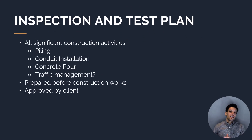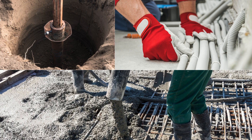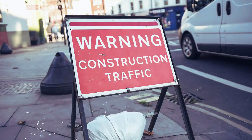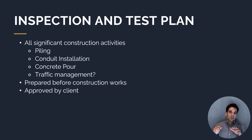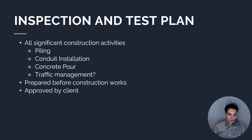Inspection and test plans are required for all significant construction works — things like piling, conduit installation, concrete pours, and any permanent construction works. But for temporary things like traffic management or establishing site facilities, you wouldn't typically do an ITP, because they're non-permanent and not being handed over to the client. You might have a checklist to follow, but it wouldn't follow the same strict and stringent ITP process.